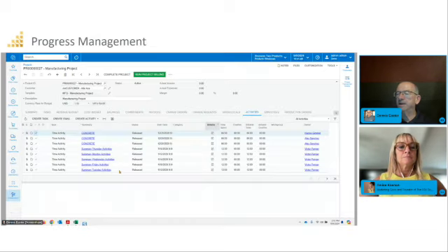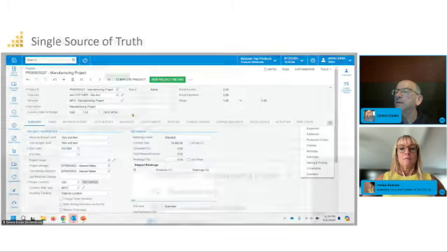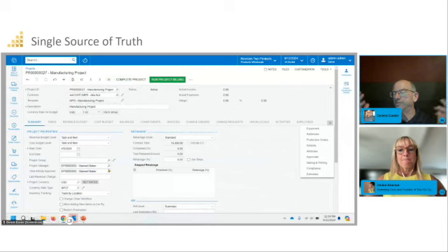And then just as a, oh, I can't scroll on the screen. I get confused whether I'm live or on a PowerPoint. So in this, there are multiple settings. The tasks themselves are the different phases. We took a look at the budgets. But the key to remember is that you build a template first, and that makes it very easy. You just assign a template to a project, and all of these details associated with the template are added to the project automatically as it's created. Did that answer the question, or do you have something more specific?